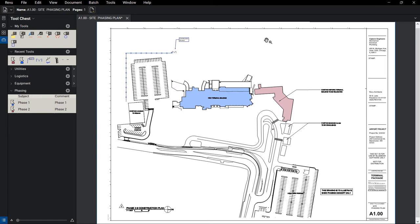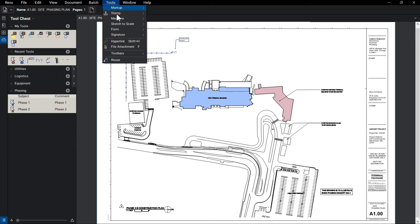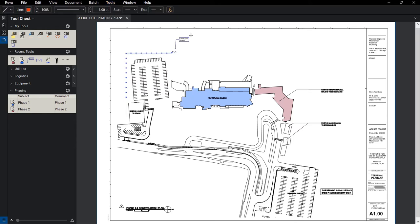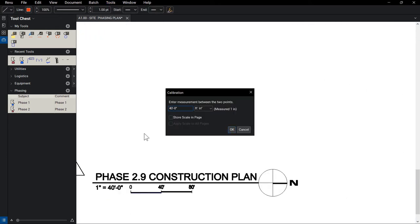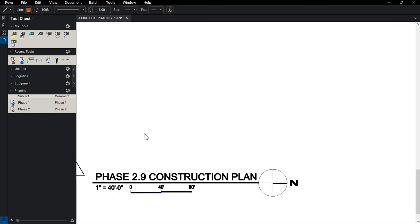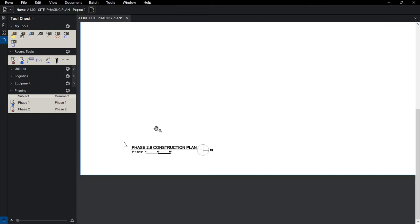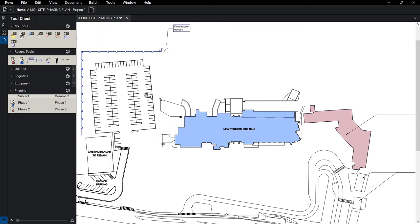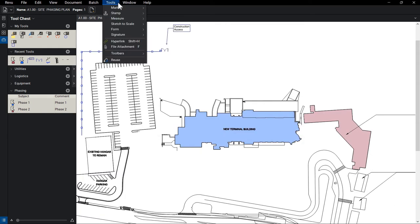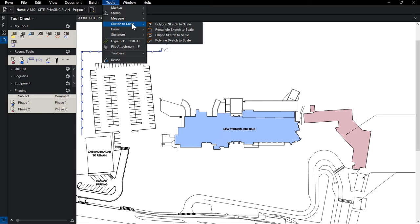Knowing your equipment will fit when it arrives to a job site is a critical component of the logistics plan. The first thing we'll want to do before taking any measurements is calibrate the PDF. Once that's done, we can use Review's Sketch to Scale tools to add scaled markups representing our equipment.